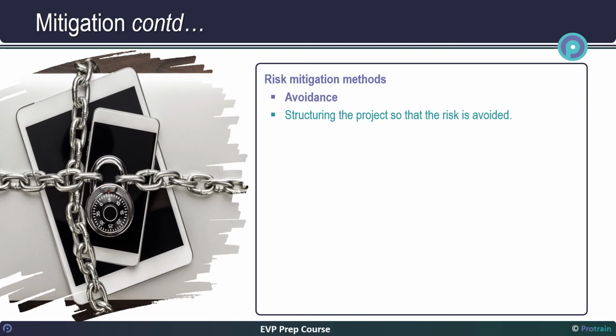For example, you are a project manager of a high-rise building. Your designer suggests a new type of foundation design that can save up to 30% of foundation cost. But the method has not been used in the region so far. You know design failure may jeopardize the whole project. Therefore, you avoid the risk of design failure, and you decide not to use the new design, and use the conventional one. Other examples of risk avoidance may include project relocation, cancellation, delay, restructure, and redesign.